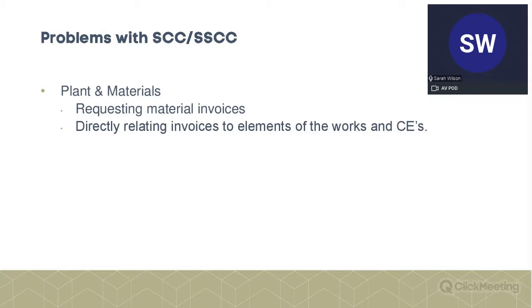Sometimes it's a bit difficult to tell. You use, I don't know, a certain amount of concrete in a compensation event, you're not going to specifically order that typically. It would come as part of an order that also covers the main work, so it's separating it out.